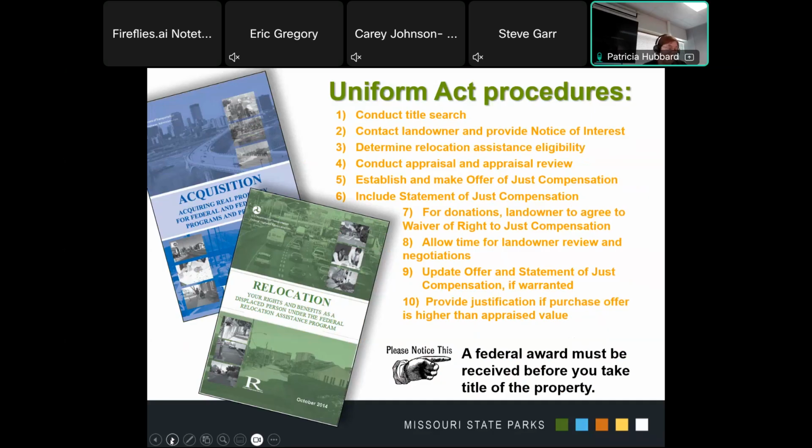If our staff and the National Park Service agree the higher negotiated price represents a reasonable cost, the amount can be eligible for assistance if significant funds are available in the fiscal year apportionment and not have already been obligated to other projects.